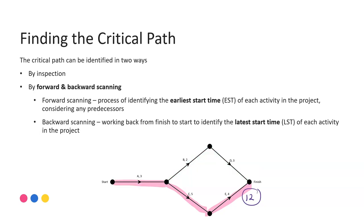For this particularly simple network, we can see it'll take 12 units to get from start to finish and the critical activities are A, C, and E. That means that B and D have some float time associated with them. It's rare though that we actually work by inspection, and so we have a process called forward and backward scanning to help us with more complex project networks and identifying those paths.